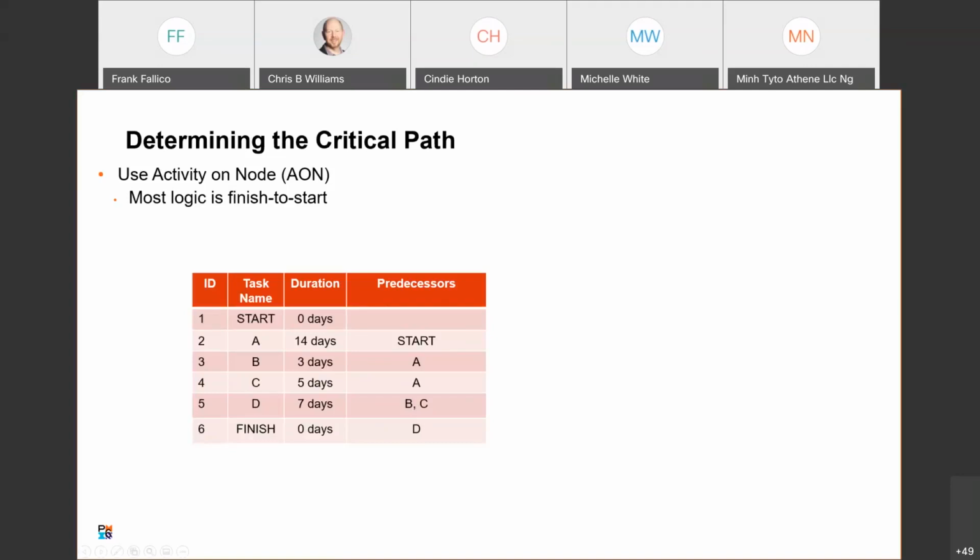There it is. Okay. On the exam, you'll likely be given a table like the one you see here, but you should be prepared to convert it to a set of tasks written down into a table like this. The first step will be to draw the diagram that represents the activities in a sequence that will reflect the dependencies and the duration moving from left to right, and each activity node will have the format as noted in the task box.